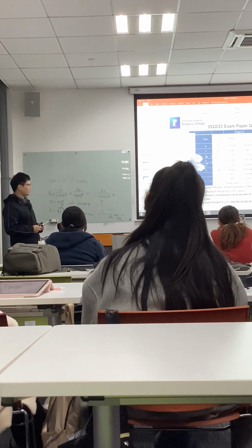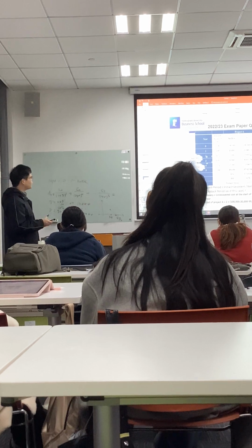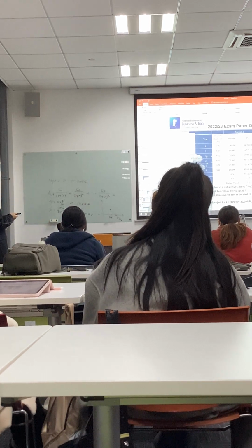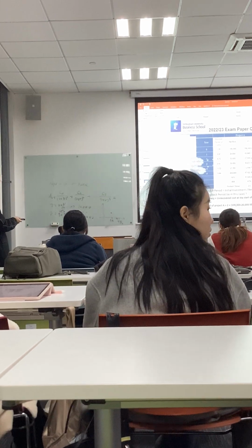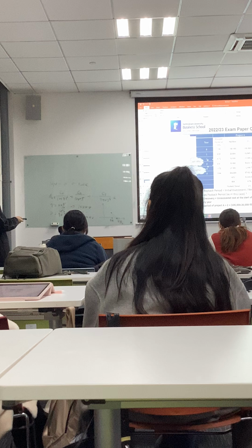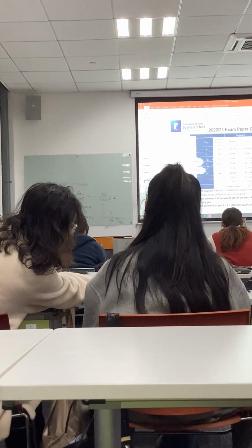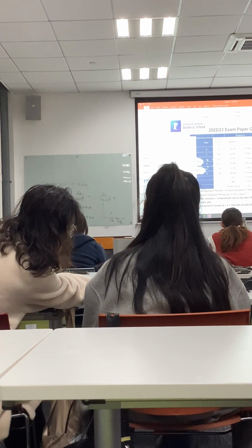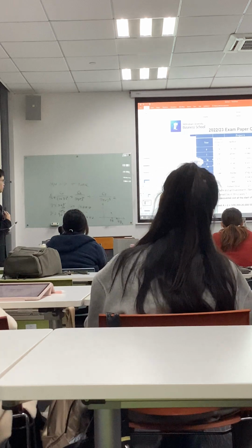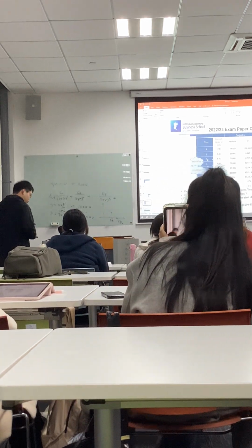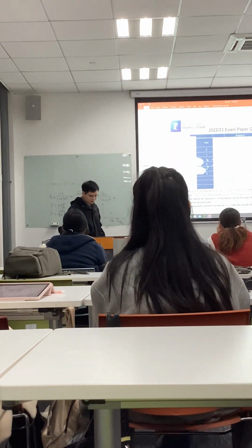We need to spend only 0.6 year in the third year to make all the cash flow cover the initial investment, right? So here the payback period is equal to 2 plus 30K over 50K, equal to 2.6. And in a similar way, we can calculate the payback period of project B. Okay, this is the calculation for these three indexes.